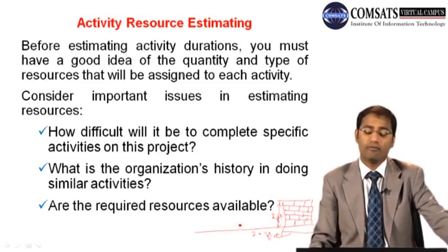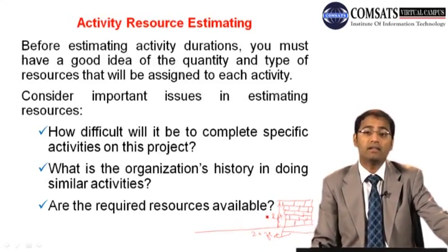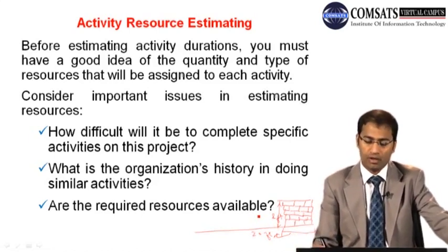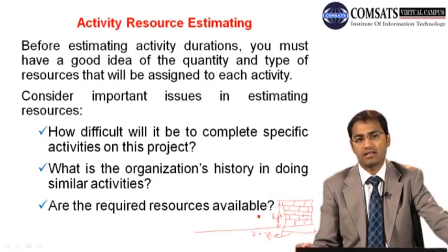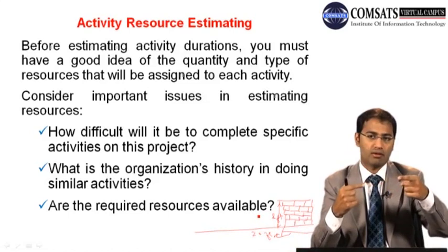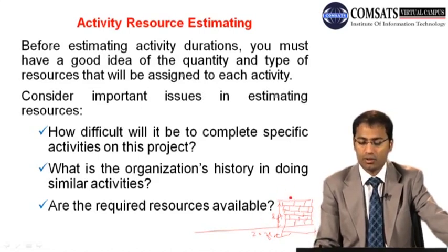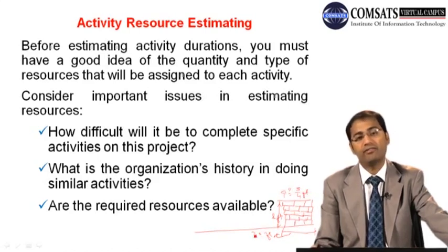Now we have this area, and another thing we need is the thickness, like whether we want a 9-inch wall, a 4.5-inch wall, or a 13-inch wall. So let's say we are using the standard 9-inch, the standard length of brick is 9 inches. So 9 inches is equal to 3 by 4 feet, and now we have 3 dimensions.